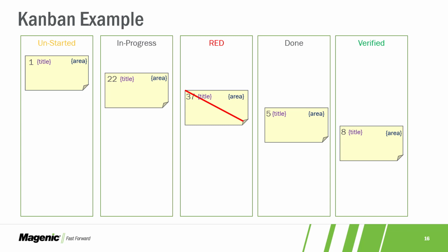So, DevOps has their priorities, and there are natural things that have to be done in a certain chronological order. For example, if you're building something up in the cloud, you have to make a project first, and then the project is a container that holds things, and so you need to create networks inside of there and assign roles and permissions and identity and do all those other things. But the idea is we want to be able to work as highly parallelized as possible, so that when things are in a block state, there are other things we could be doing. And remember that documentation and testing is never a waste of time.